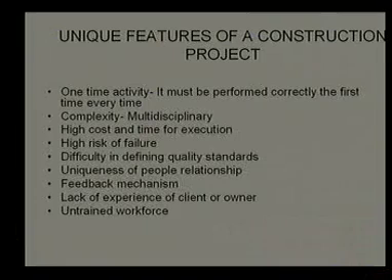So, I have highlighted a few points which are unique to construction projects. For example, the first point is that it is a one time activity. Since it is a one time activity, you really do not get time to learn the process and repeat it, like in manufacturing. In manufacturing, suppose you have been assigned a task, initially you may spend some time learning and then gradually you will master it, so your productivity increases. But in construction, since most of the tasks may be of a one time kind, you really do not have a chance to improve. So, whatever you do must be performed correctly the first time and in fact every time.